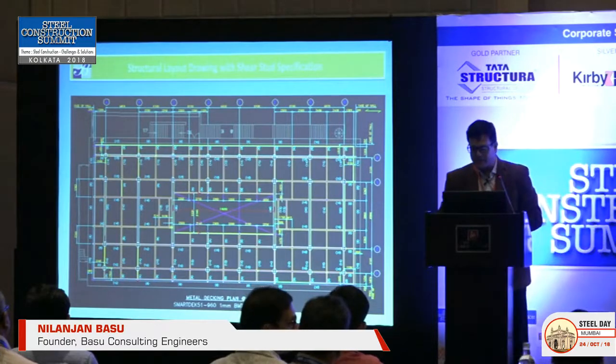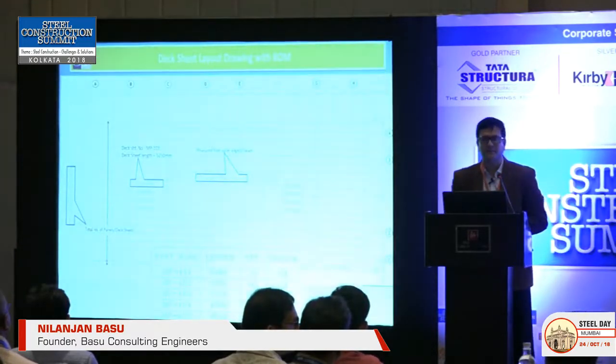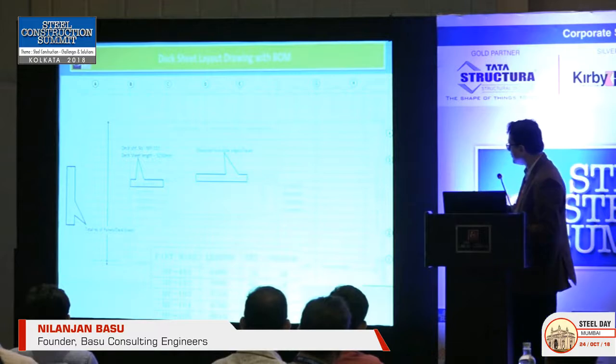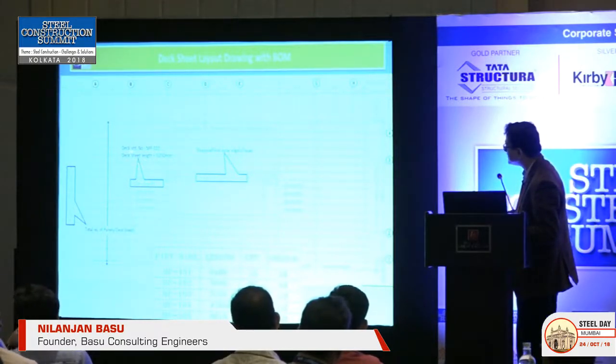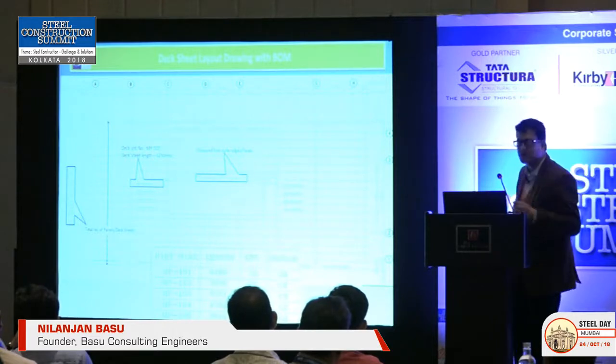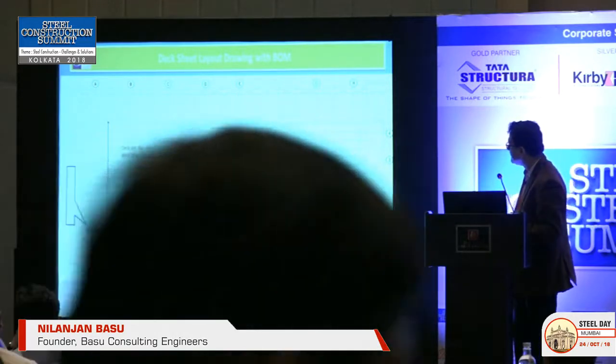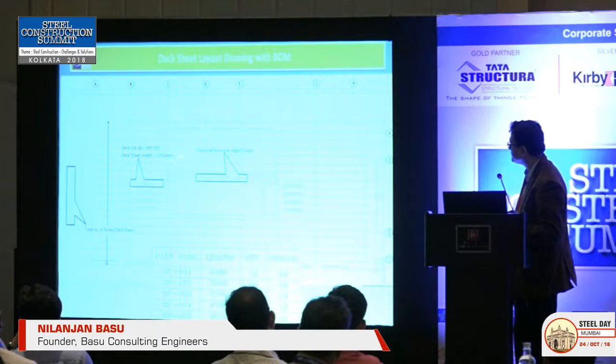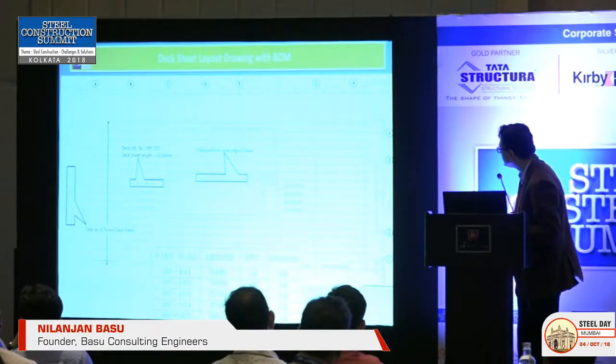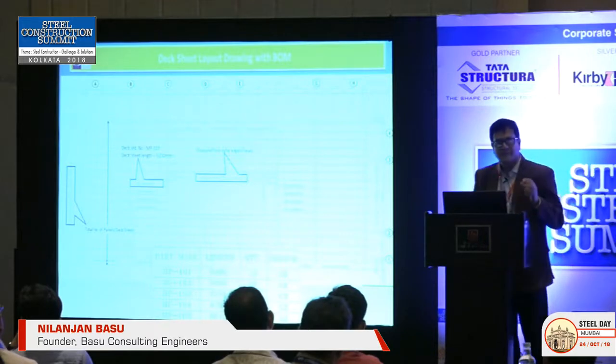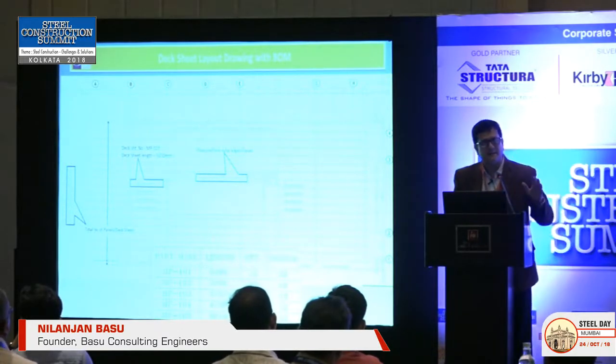Once he did that, what he essentially gave me is this drawing. So he formed the layout of the deck. You see, each of these has the deck number, it's MP103. It has the deck length. For this one, it's 5250. For this one, it's 5000. This one is 4500. So these are the decks he specifies in the layout.